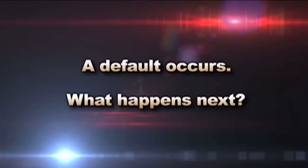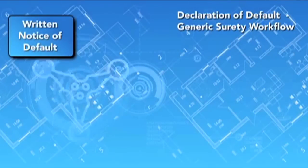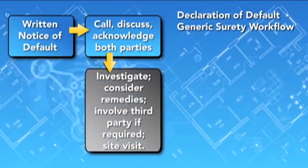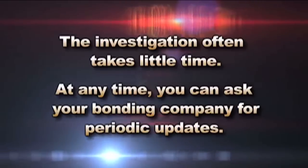When a contractor actually defaults, the first step in the default resolution process is investigation. When the surety receives notice that the contractor is in default, the first thing they'll do is write back immediately to acknowledge that notice, then begin gathering information and investigating the circumstances of that call of default. In many cases the investigation will take very little time, particularly when the contractor isn't solvent or can't continue. In other cases — where the contractor is still solvent and disputing the call of default — it takes longer. If you request it, the surety will provide periodic updates on the investigation's status.